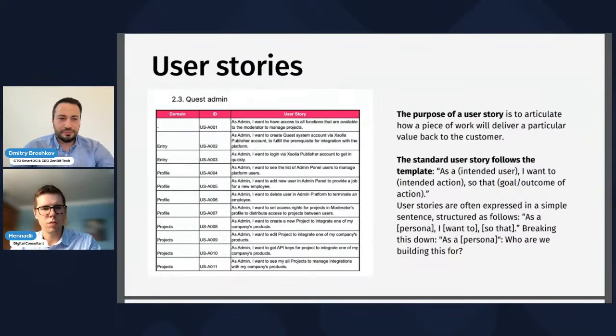So what you do is you think about the milestones, about the user roles, and you write in a simple way, like: as an admin, for example, I want to log in to the system and do this and that. I want to be able to perform these actions. Very broadly, so that, as we say, every grandma can understand what's happening. You need to write them so that at the end of the day you can track if something is working or not on a very high level.